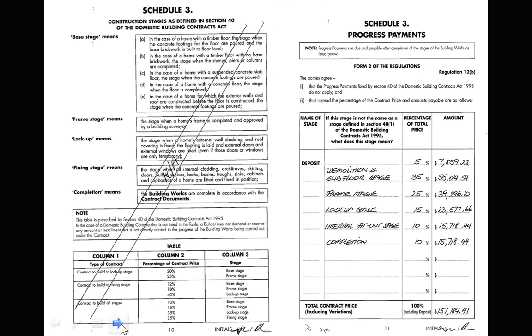What are we going to do about it? Is there any way we can reduce this? Because I feel a bit nervous about it. So he said, well, you're protected by the home warranty insurance, which is mandatory for all domestic projects in Victoria. And if anything happens to me, then you can claim on the insurance to get the project done in case I'm run over by a bus.